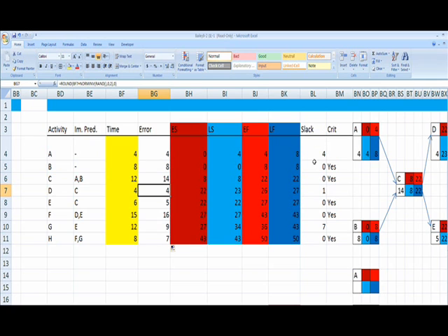However, if I go 4, I have a smaller slack. Let's see. And as you can see, if it's 5, then A becomes a critical activity. So if it took longer, 5 days, then for the most part, we have to start this on time, and there's no late start. So as you can see, everything's changed based on that error.